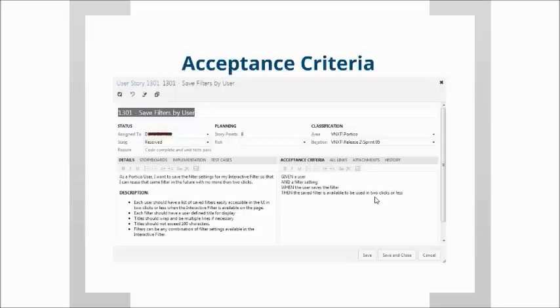So if the development team provides this solution but does it in 3 clicks, then the product owner does not have to accept it. He can say rejected, go fix it. Now, there may be an opportunity for negotiation, because it could be that the architect comes back and says, listen, in order to deliver this in 2 clicks, it will require about 3 months worth of work. Just the way the system is architected, there's no way that we can provide this in 2 clicks. So if you want to add 3 months worth of work, then we can do it, but I just need to let you know that.